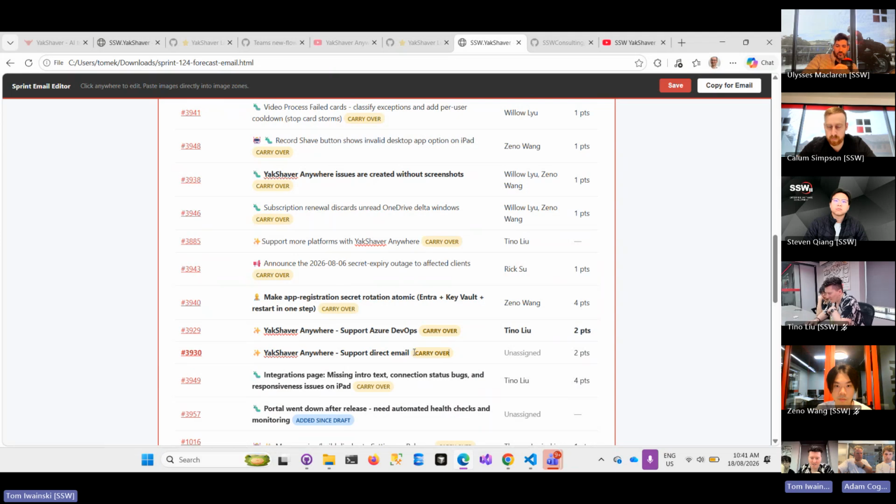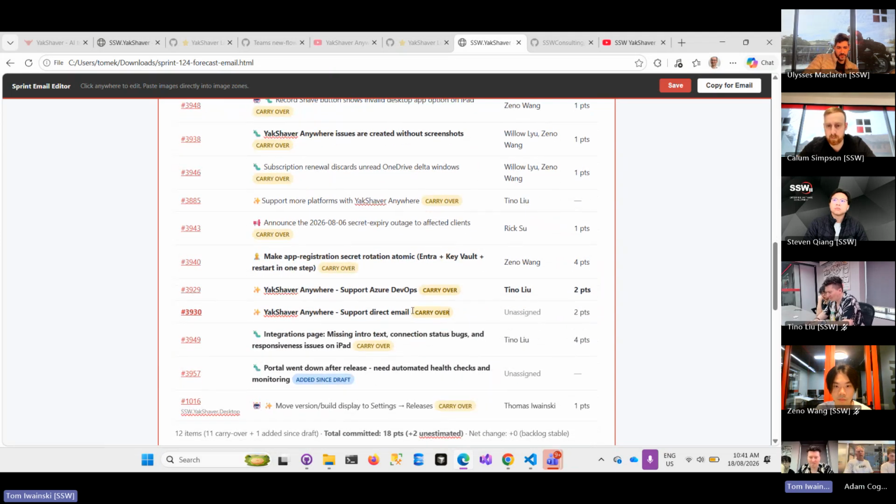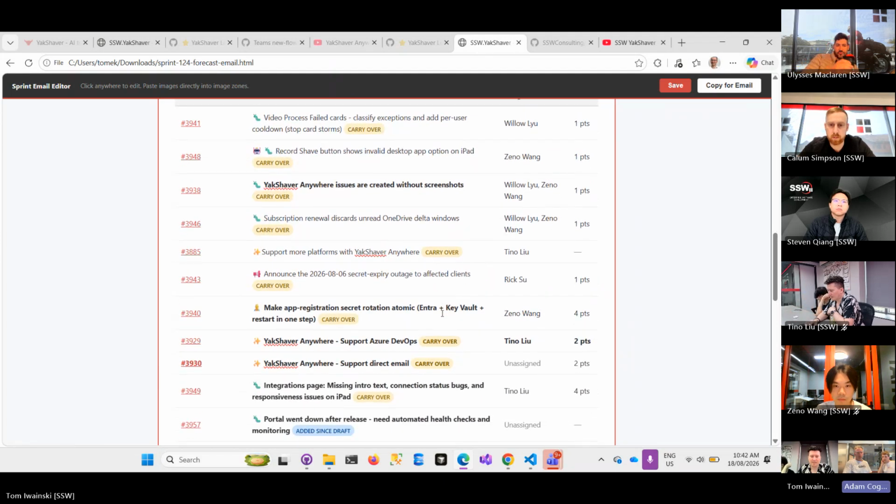I had to rename them and then I accidentally deleted the bolding of them. In addition, they need to be at the top. When you guys look at a sprint backlog, it should always be ordered in the order that you plan to work on. Yeah, so good call. Most important things at the top, the least important at the bottom. Just like a normal backlog.